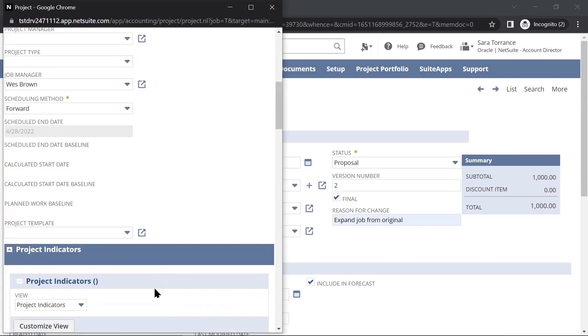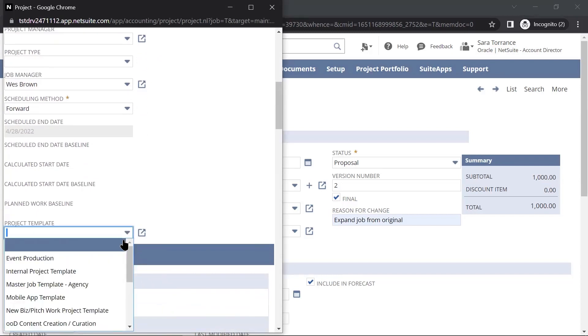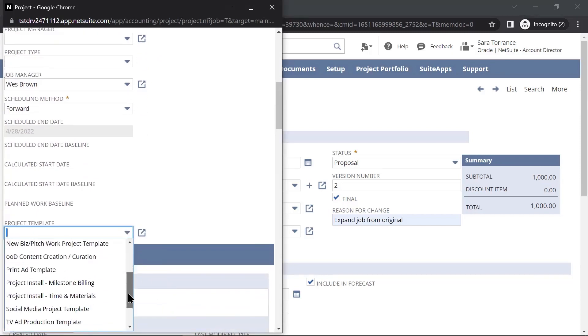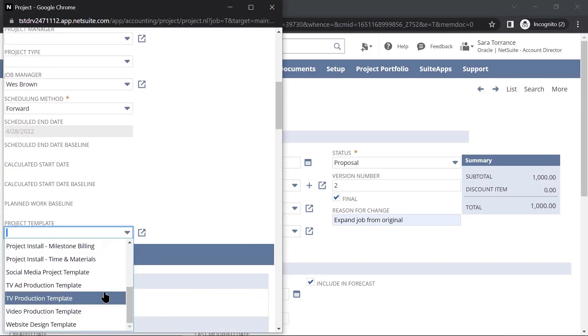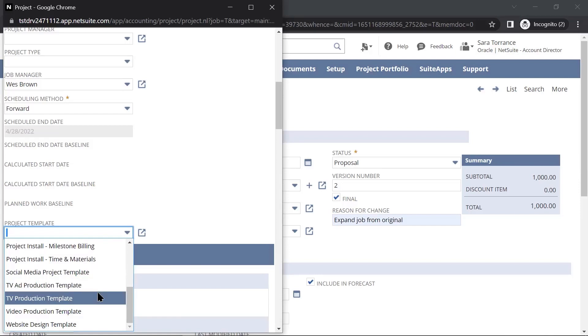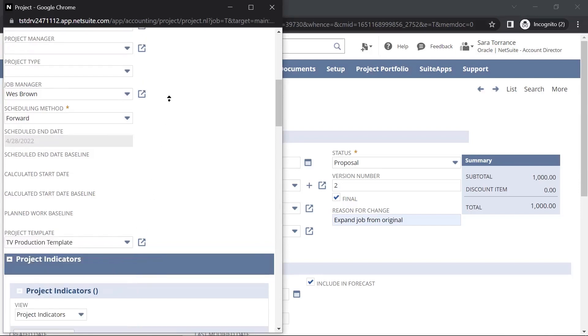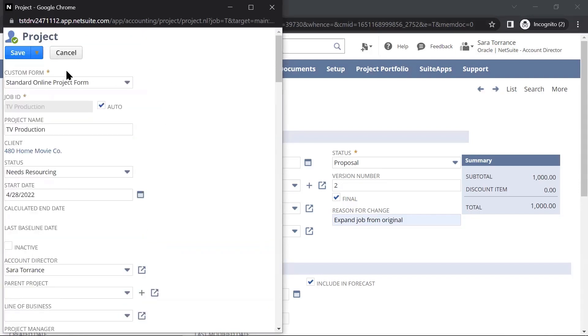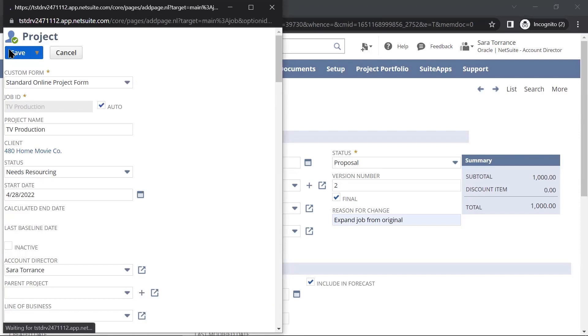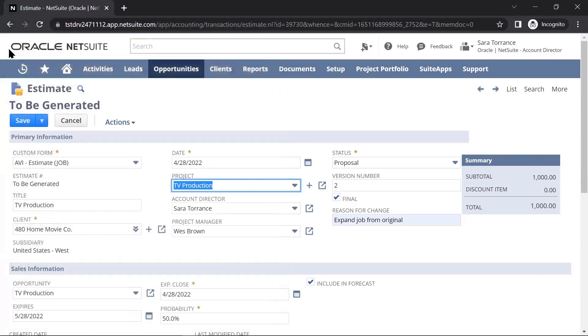And I can start this project from a template. Using a template helps the organization know what kind of resources are going to be needed and when, so that the resource managers and project planning activities can be done by different people within the organization, and they all have a good idea of what is going to be needed for this job.